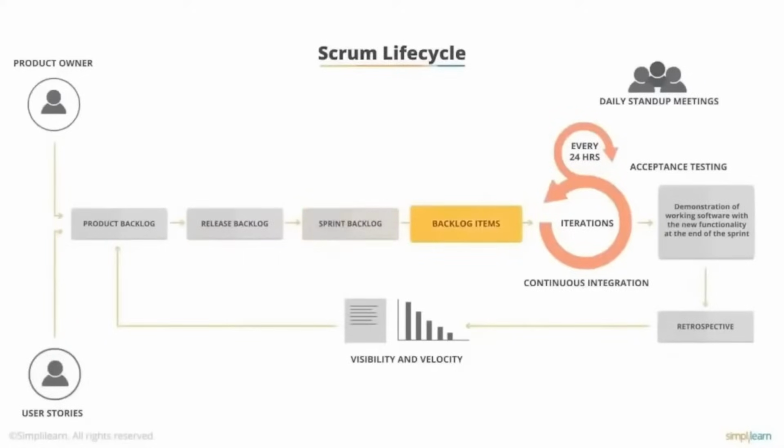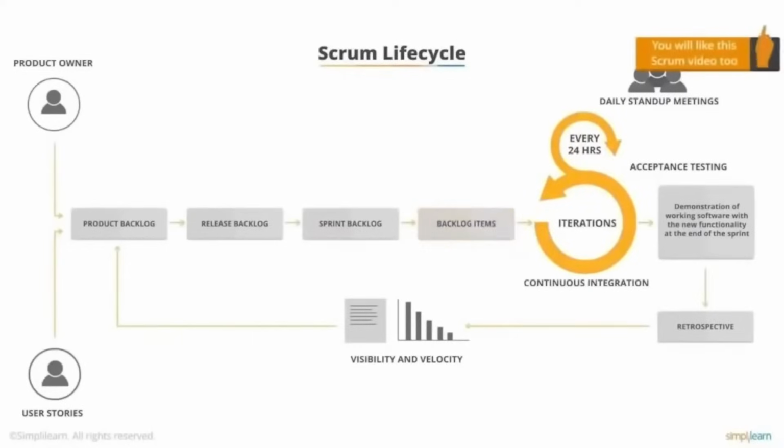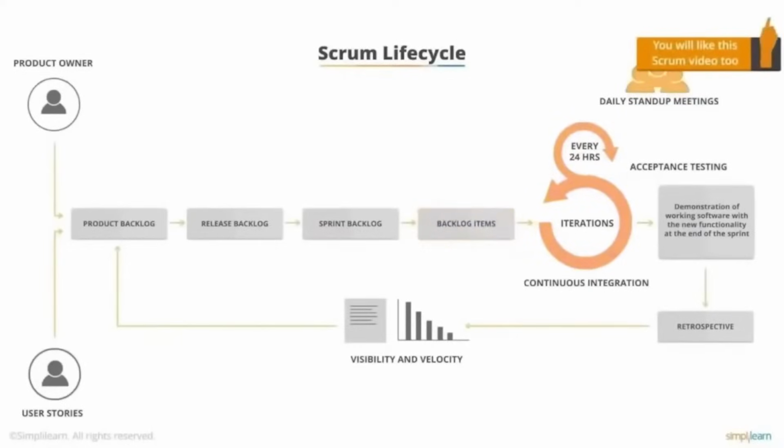Once the sprint backlog has been determined, the team then disaggregates each user story into tasks. During each sprint, the user stories are developed. As the code is written, it is integrated into the system, and daily scrums are held. At the end of a sprint, there is a sprint review where the working software is demonstrated and presented to the customer for acceptance.